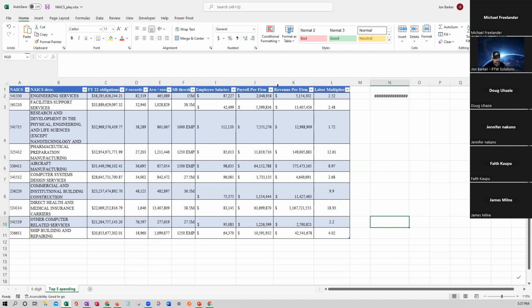One of the other things I mentioned earlier about the way we've done price analysis in the past that have been subject to NCMA scrutiny is we use this labor multiplier. What this does is take industry averages as defined by the census, and the source data is anonymized tax receipts.